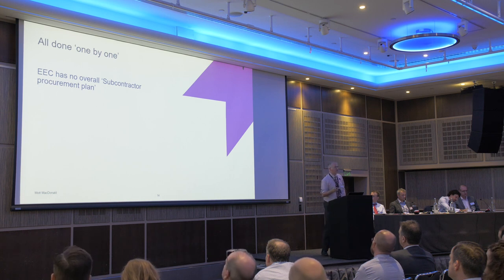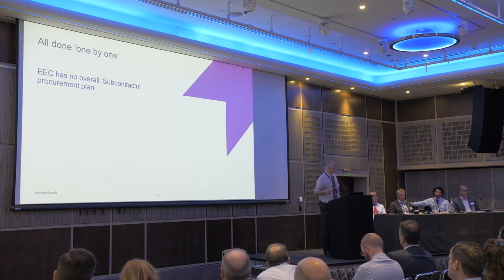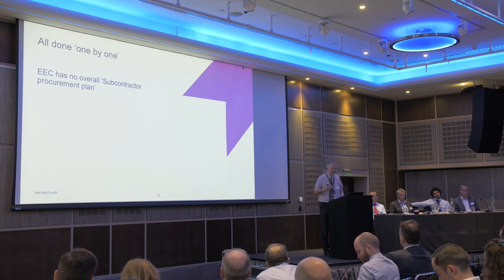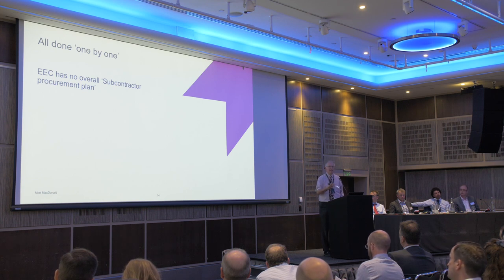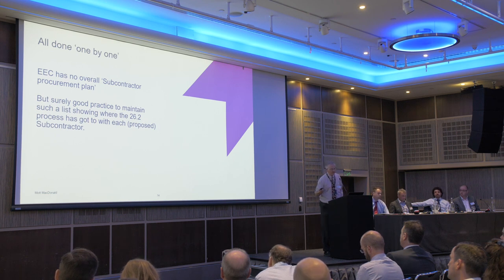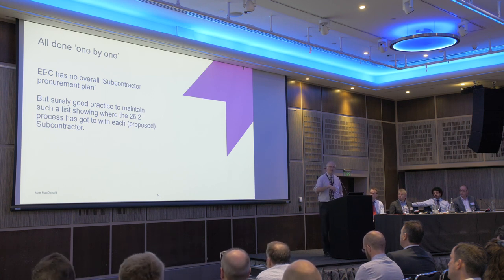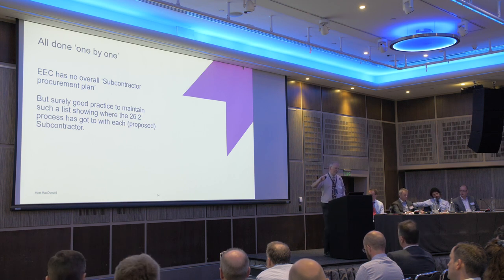Contractors — do you have somebody who looks after subcontracting on your project? They probably have a procurement plan. Be aware: NEC does not have that. NEC just has this meticulous one-by-one process of asking 'can I use this subbie?' Logically, you would keep a 22.2 list on your job to make sure it's clear where you've got to in terms of accepting or not accepting proposed subcontractors.